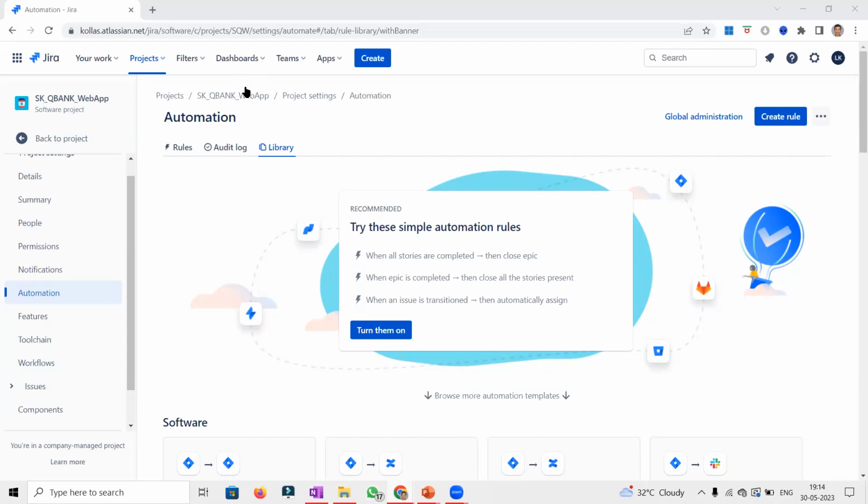We created a custom status stating that it will not be implemented. At some point of time, we realize the epic is no more valid or no more relevant for implementation. In a backlog refinement discussion or one of the sessions, the product owner might say, Satish, we don't want to implement this epic. This is no more valid. We need to create a different epic for some other functionality. Then I, as a Scrum Master, might be marking the epic as completed.